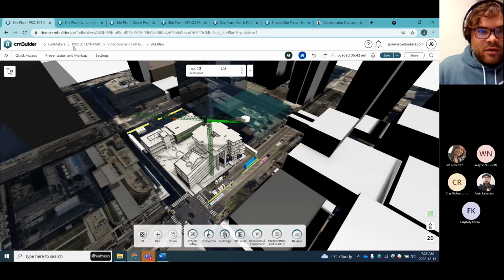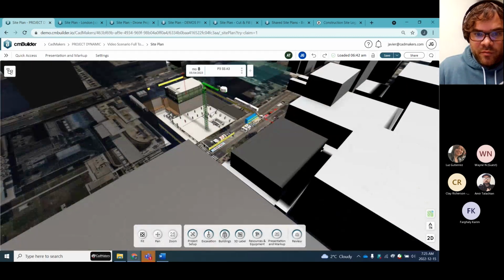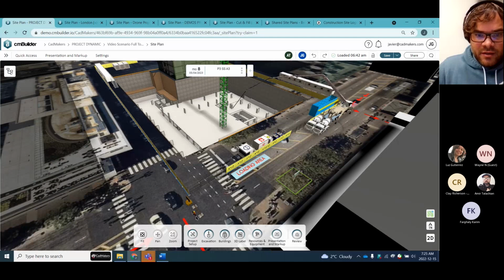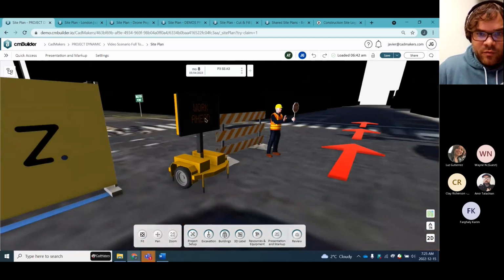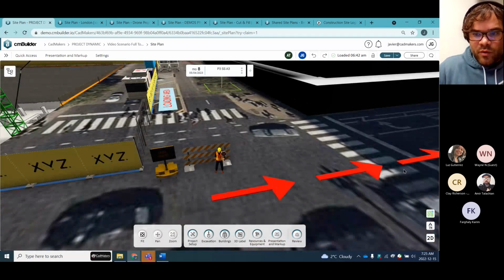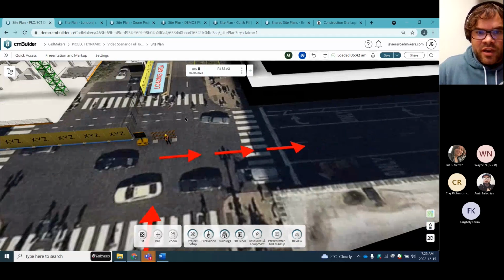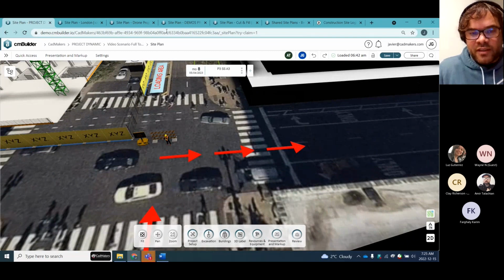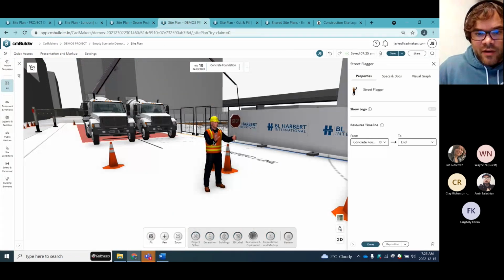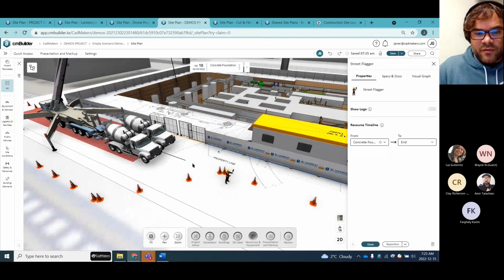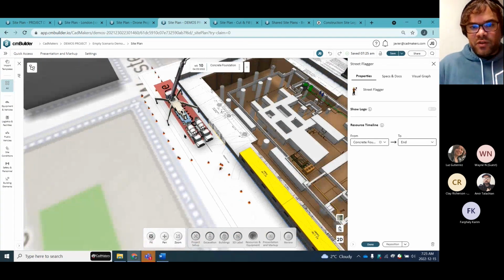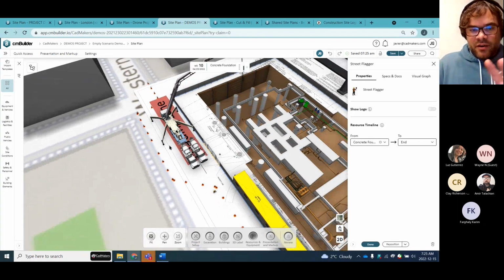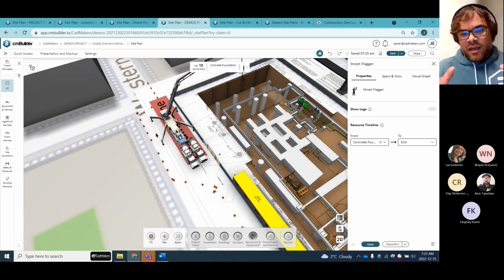And then I think you may have seen at the beginning, things like signage. We have a whole bunch of people requesting things like this, right? So all these types of site logistics, work ahead, whereas the signage is going to be routes with arrows: okay, we're diverting traffic on these days. On big pour days, we're going to divert traffic in the following ways, and you can show arrows and stuff like that and be a lot more precise than what I have here, which is nice. So you can build this whole milestone out to understand the full site logistics of this.